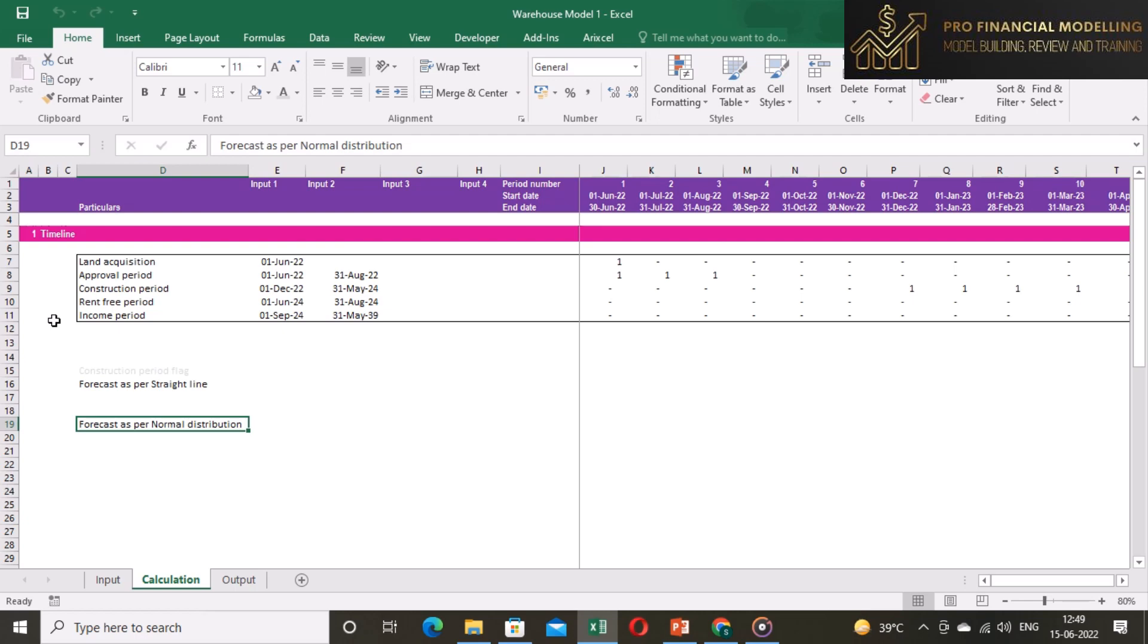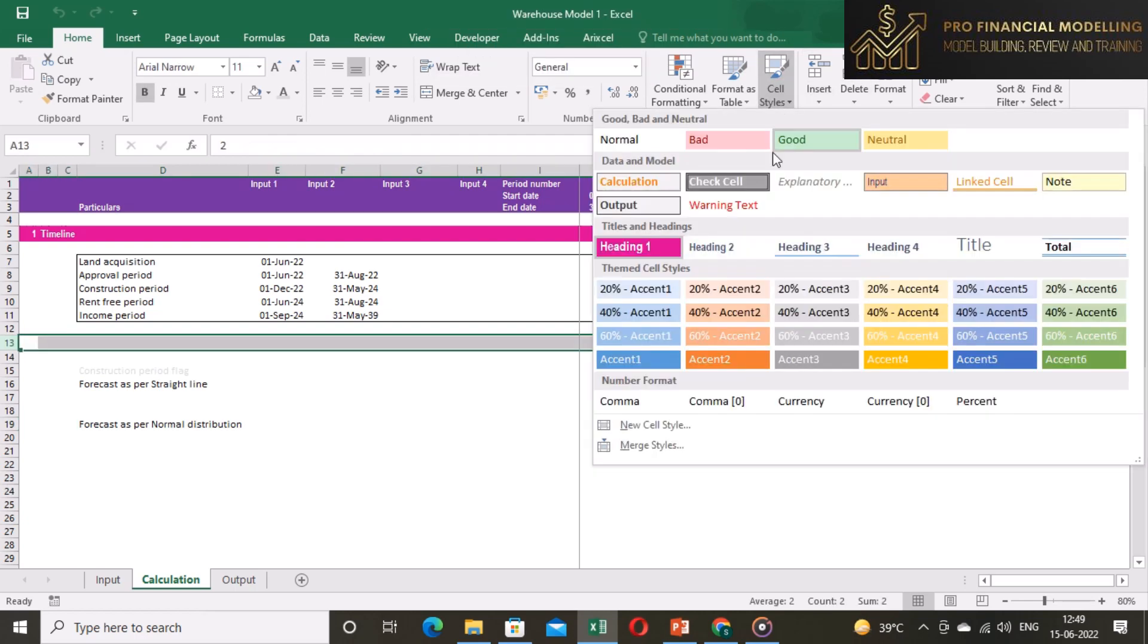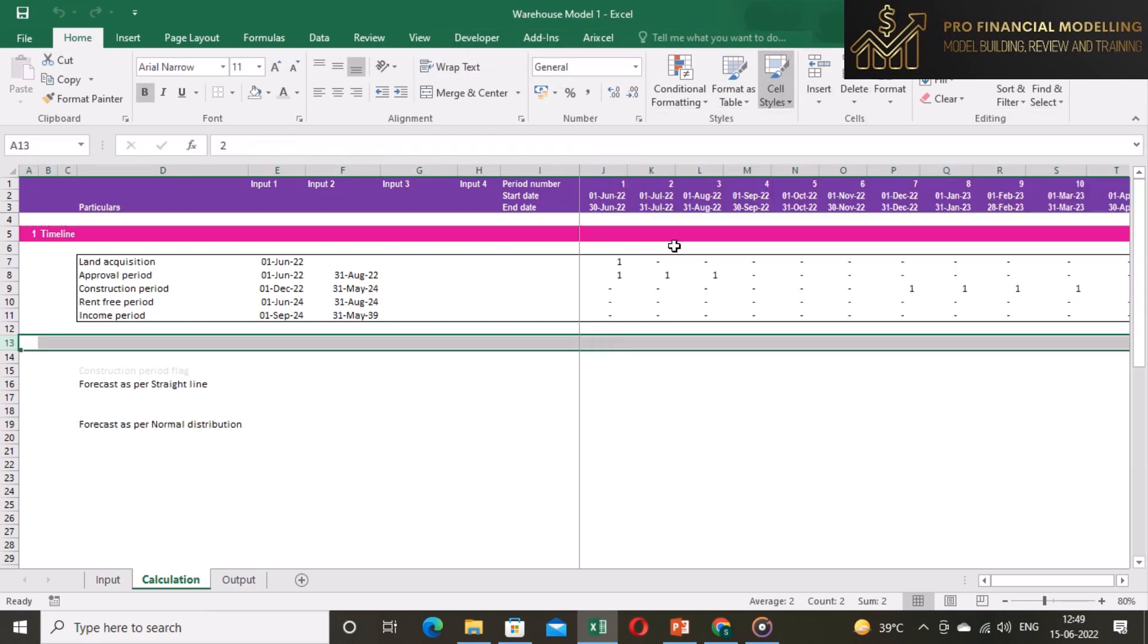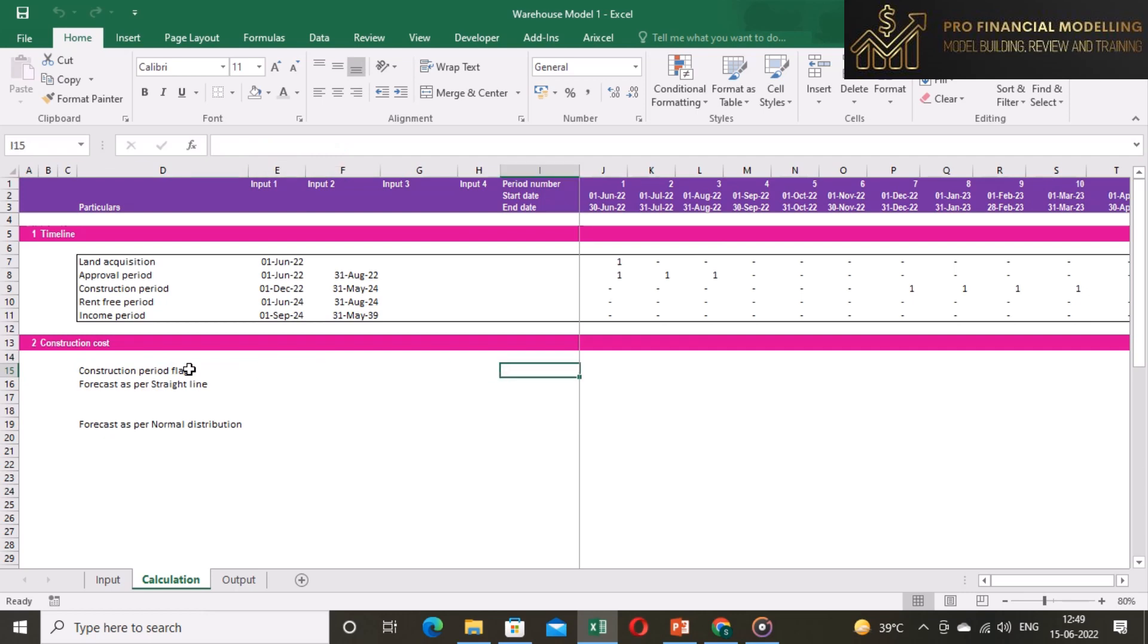Let's start forecasting the construction cost. The first step is creating a header for construction cost and then call up of construction period flag in construction costs block.